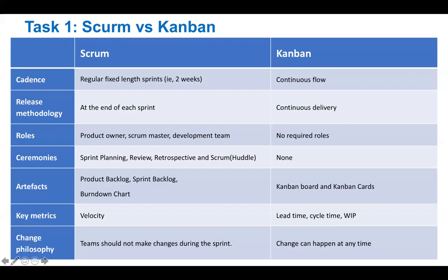We talk about work in progress. I haven't been able to think about these measures in detail, but it's about thinking about all of those important measures, like work in progress. How many items are currently in progress on that Kanban board? The reason is that usually in each step in the Kanban board, you are limiting how many items you can process at any particular point of time. So you incorporate that measurement to get a guide on what we can deliver at a particular point of time.